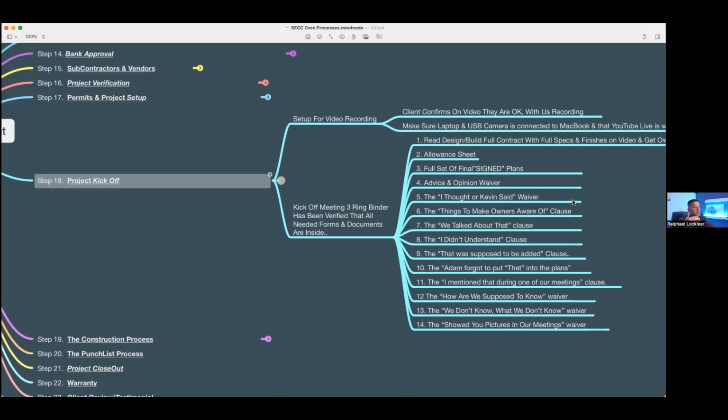But the change order consideration fee is meant to deter change orders. And the only way you're going to continue with a change order or even paying a change order consideration fee to the tune of $500 or $1,000 is if it's a really important change order, because that's just to consider it. Now it depends on how much time it's going to delay the electrician or the plumber. Plus, now it gives me time to go talk with them while they're waiting, because he's going to bill me for that time he's waiting, and I got to include that in the change order fee beyond the change order consideration fee. You see what I'm saying?